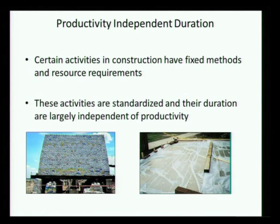Are there any questions on what we call parametric estimating? This is typically what we did here — productivity times quantity — and it is parametric estimating. It is the most numerically sound way to go about it, and you understand the challenges behind it. The uncertainty in getting the duration itself is a big question mark which sometimes causes most of the disruption in a project schedule.